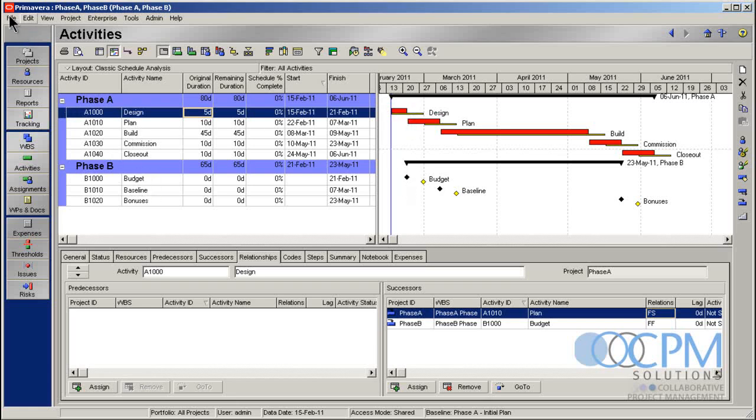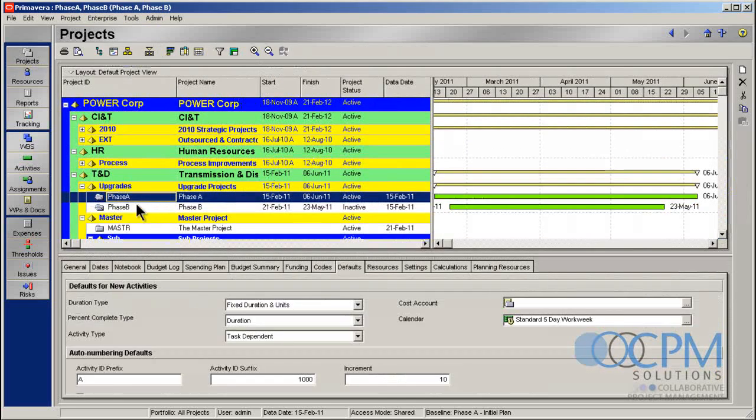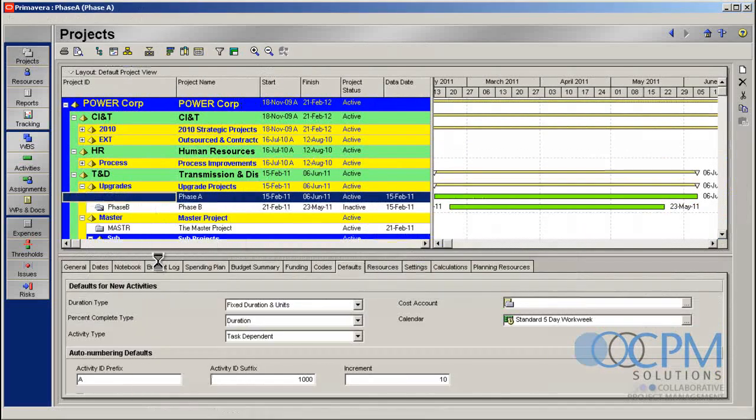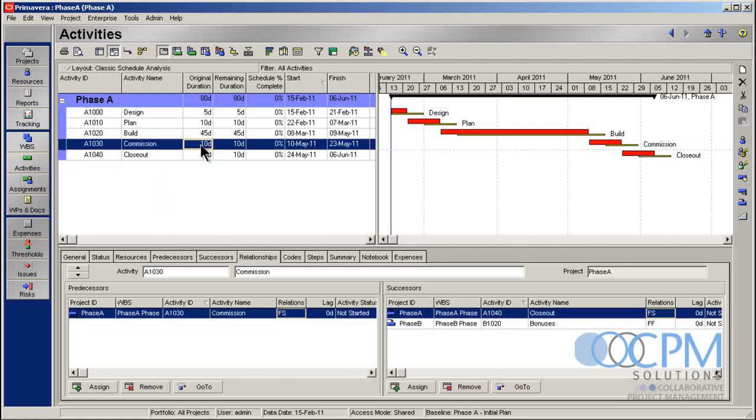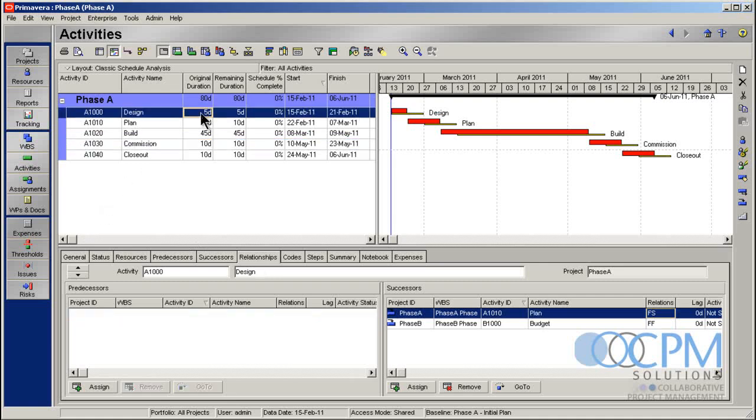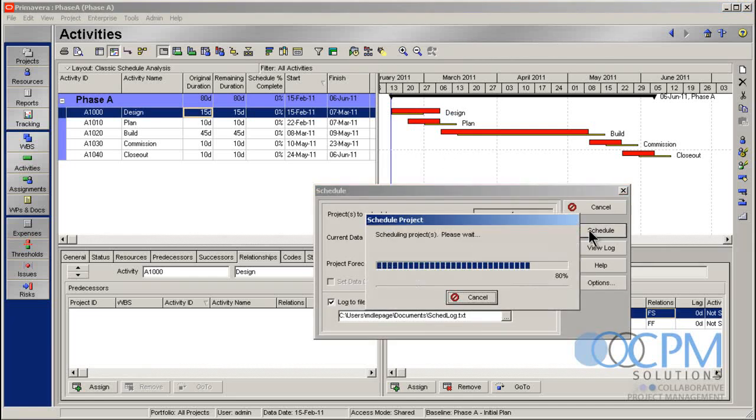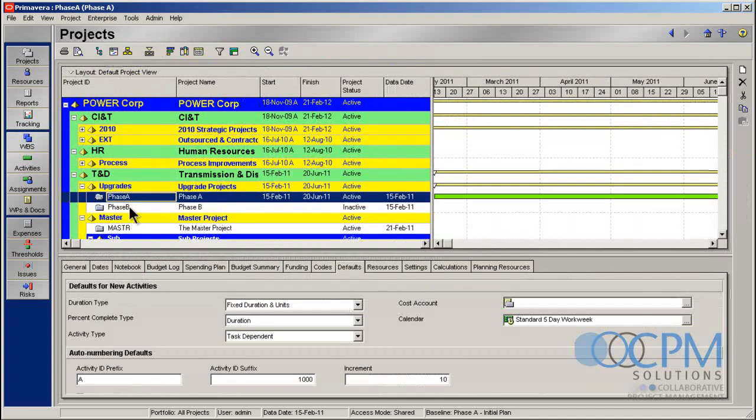Now here's what's really interesting is what if I choose to just work with one project at a time? So let's go and just open up phase A. Now I just have phase A open. The other project is closed. How does this work in Primavera? What happens if I make changes to one project? How do they get reflected in the other? Well, here's what we'll do. We'll take our commissions, well, you know what, we'll make it even simpler. Let's increase our design to 15 days. Go ahead and reschedule this. We can see the changes versus the baseline here. What happened to project B, phase B. Let's go and check it out.